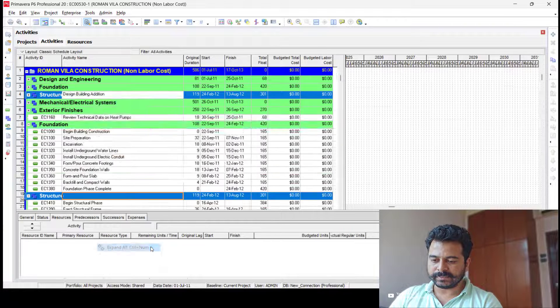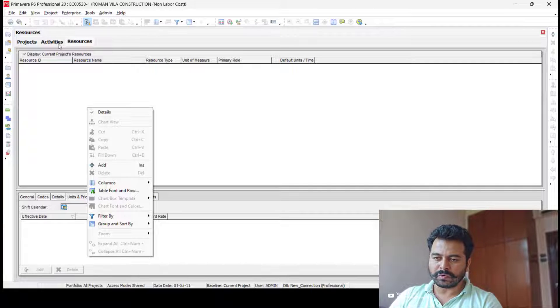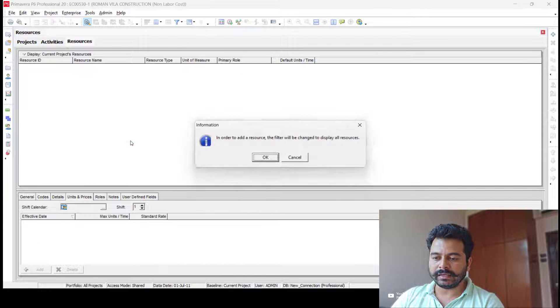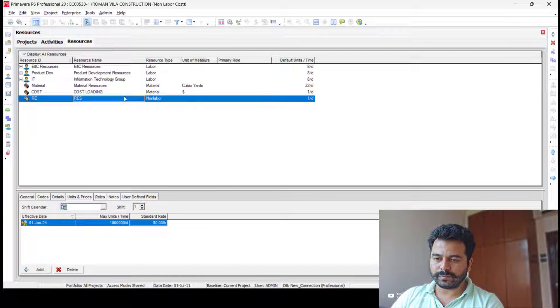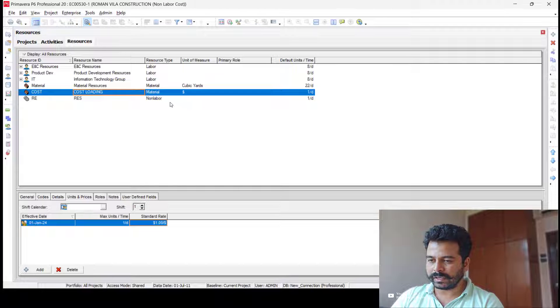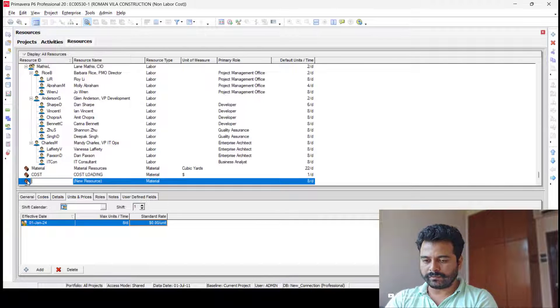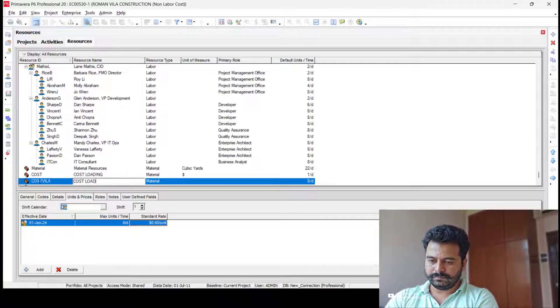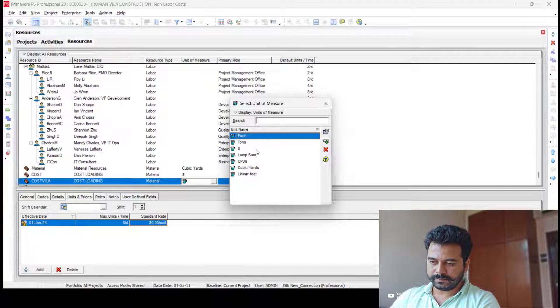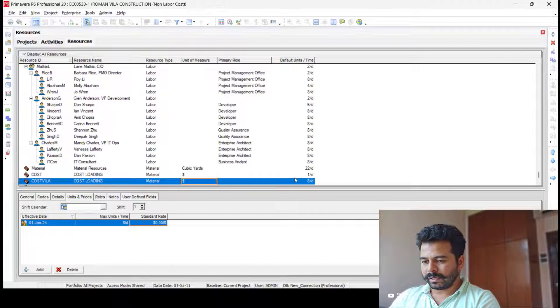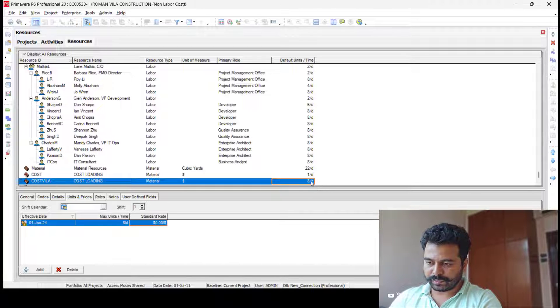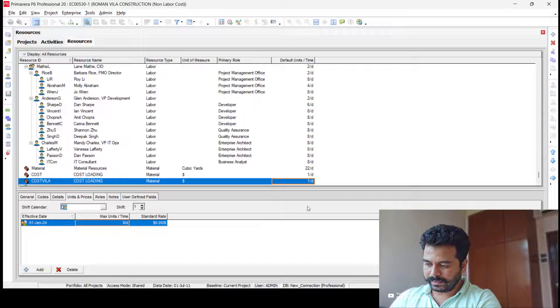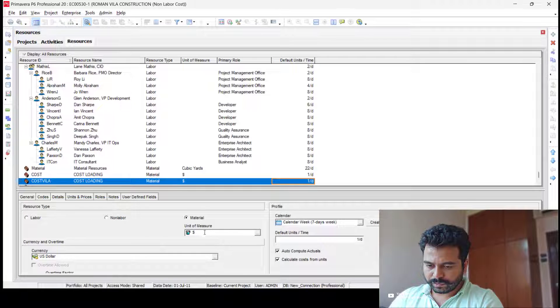I'll expand it again. So I'll go to Resources. There are no resources associated with this project now, so I'll create a resource. I'll add one with the resource ID 'Cost' under Material type. Then you have to select the dollar icon, and it's very important to check the units per time. The default units per time is eight per day, so it has to be changed to one per day. Then select the unit of measure.